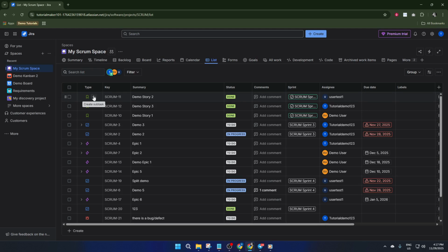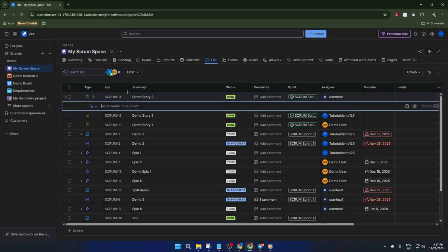The first thing you want to consider is delegating the creation of subtasks. Why? Developers possess the technical insight that enables them to pin down the detailed steps needed to complete a story. Encourage them to write their own subtasks. It's empowering and the best use of resources.